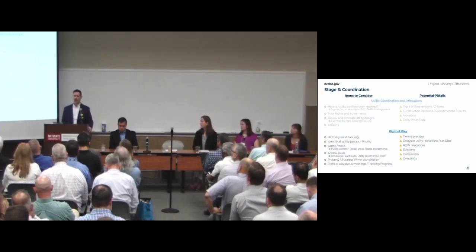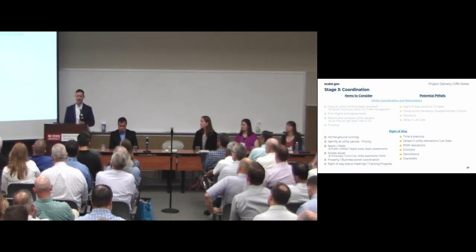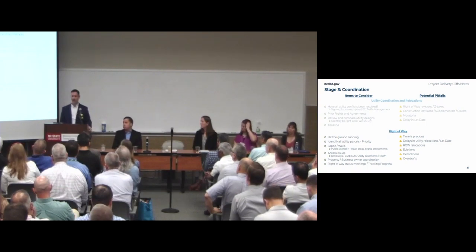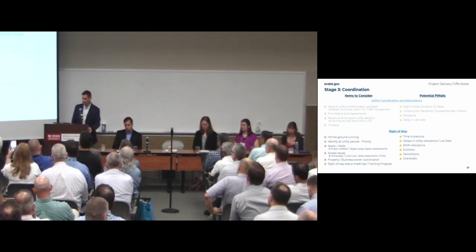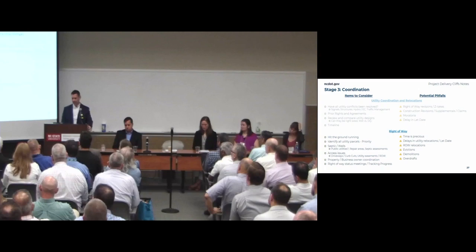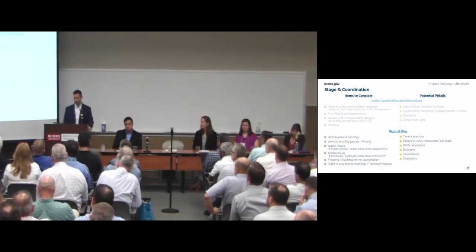And as you're looking at it, talk to your county health department. Some will accept private assessments, some will not. If they do, it usually will save you time if you can get your firm to utilize a private company. There is still a review time for the county to review those, but it typically does speed things along. So talk to them early and make sure that will work for your project.